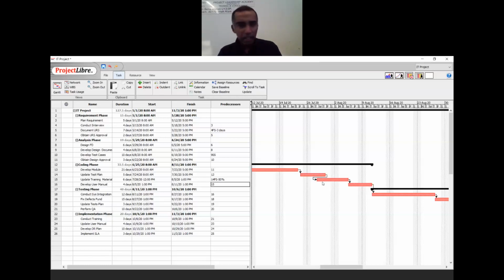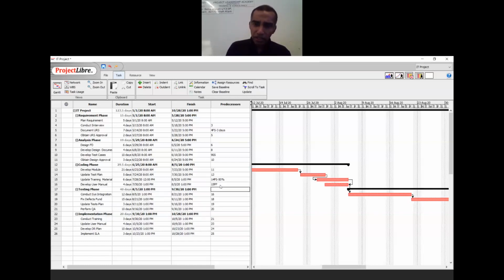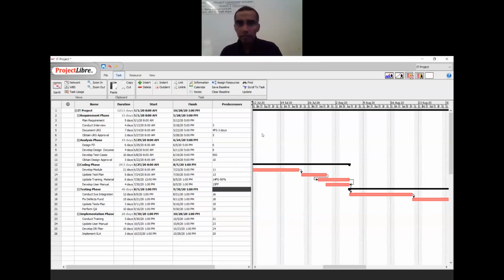And the last one, develop user manual, which is line number 16 now. I want it to finish at the same time as line number 15. So if I want to finish at the same time, then I say 15 finish relationship. So you notice both of them finish at the same time. So that's how you enter your predecessor column.